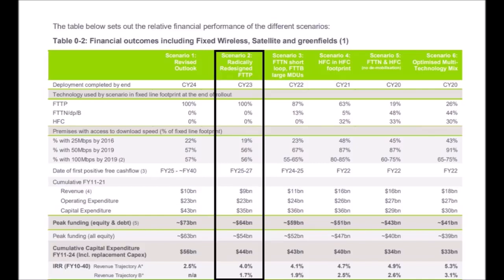That report showed that a full fibre to the premise rollout to 93% of premises in Australia, that's 10.23 million FTTP premises, could have been done for $64 billion and by 2023, although likely much less in cost and time, with overseas cost reductions in fibre rollouts, like in New Zealand, since that strategic review was written.